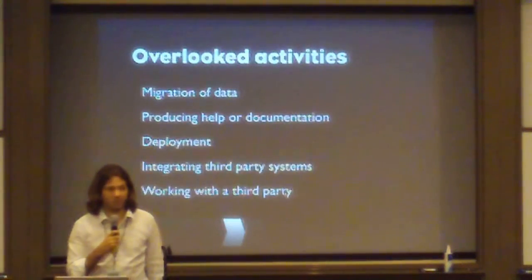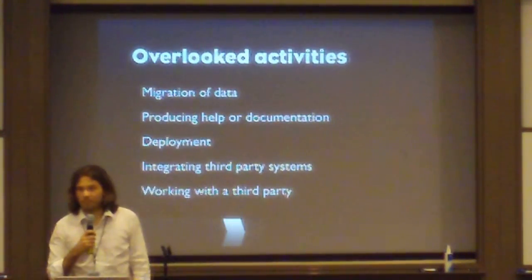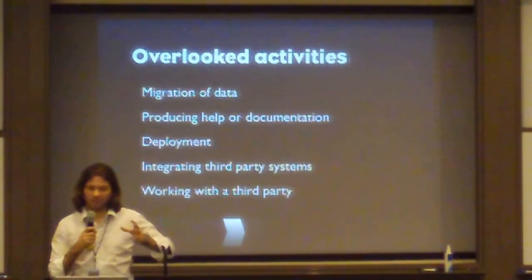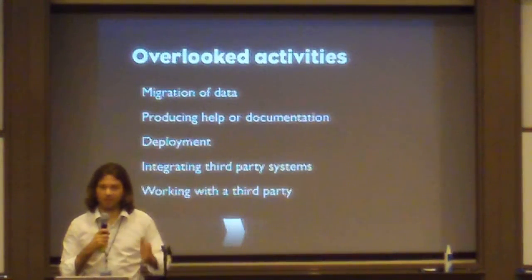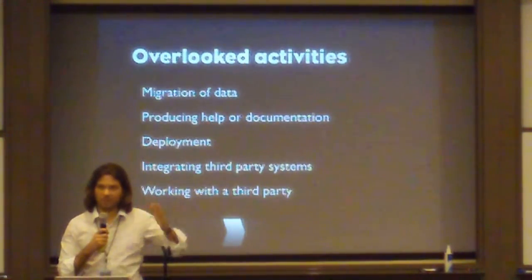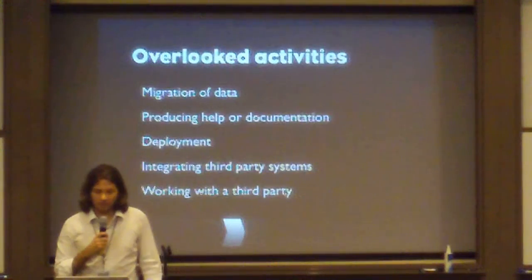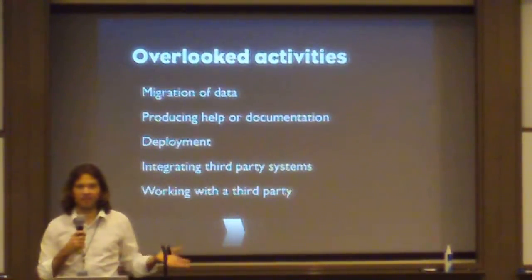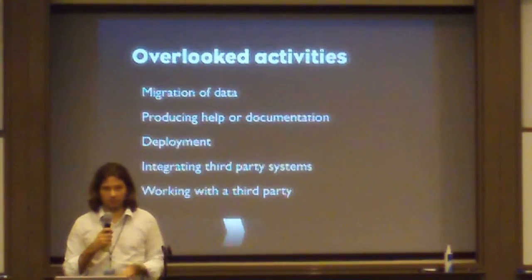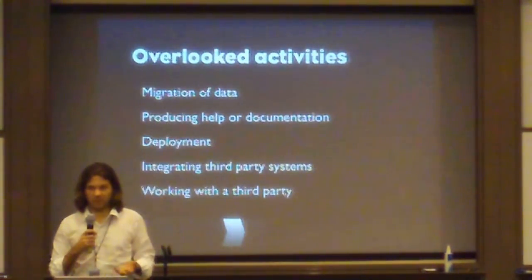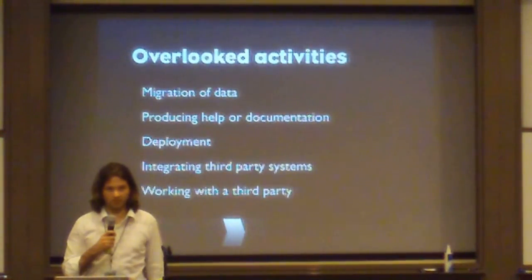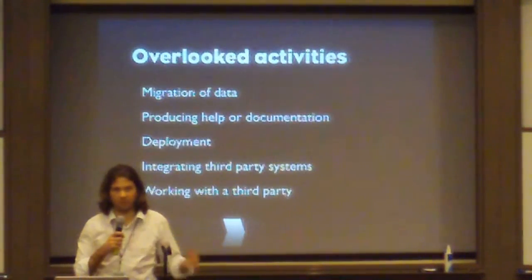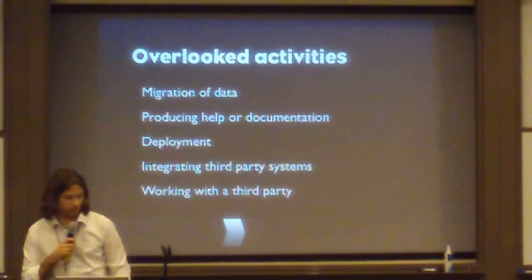Integrating third-party systems. Third-party systems are really scary. If possible, they should be handled as separate projects. You should not include them. If it's a major integration, you should put it separately, and you should put in the time just to understand the interface and figure out a solution. Or working with a third party. For example, imagine that the client wants you to interface with a design agency, and they're not very skilled or used to the web. You have to take into account how much time they will take, and either do a running account or put enough time on the side to take that into account.